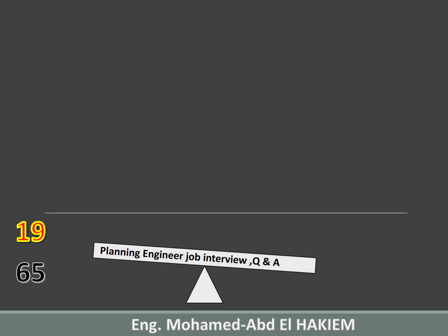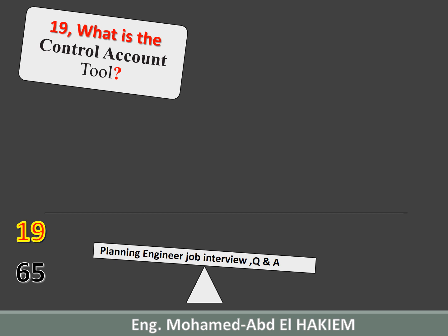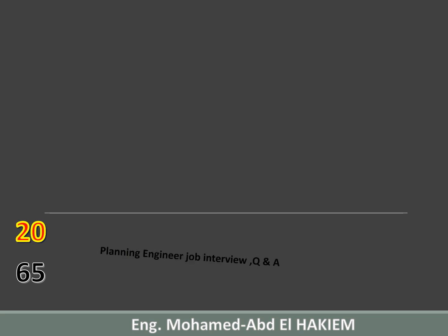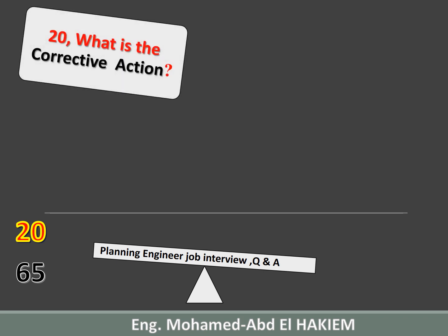19. What is the control account tool? Control account tool is a management control point where scope, budget, actual cost, and schedule are integrated and compared to earned value for performance measurement. Control accounts are placed at the work breakdown structure. Each control account may include one or more work packages, but each work package may be associated with only one control account. Each control account is associated with a specific single organizational component in the organizational breakdown structure, also called a cost account.